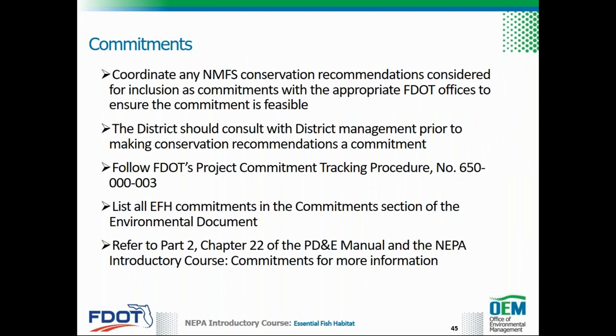Any NMFS conservation recommendations considered for inclusion as commitments in the environmental document must be coordinated with the appropriate FDOT offices to ensure the commitment is feasible. The district should consult with the district management prior to making conservation recommendations a commitment. Commitments related to EFH made by FDOT over the course of project development should be documented according to FDOT's project commitment tracking procedure and included in the commitment section of the environmental document. The project commitment tracking procedure is available on FDOT's Policy and Process Management Unit website.